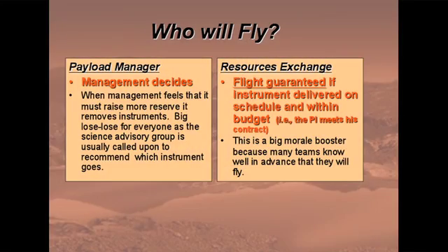Who will fly? We've had a lot of discussion or mentioning of that in this forum earlier. Management decides. When management feels it must raise more reserve and it can't do it, it removes an instrument. Here, the flight is guaranteed if they deliver on schedule. It's a big morale booster because every trade is a win-win transaction. And if you're trying to build morale, having a series and a history of win-win interactions is very important.